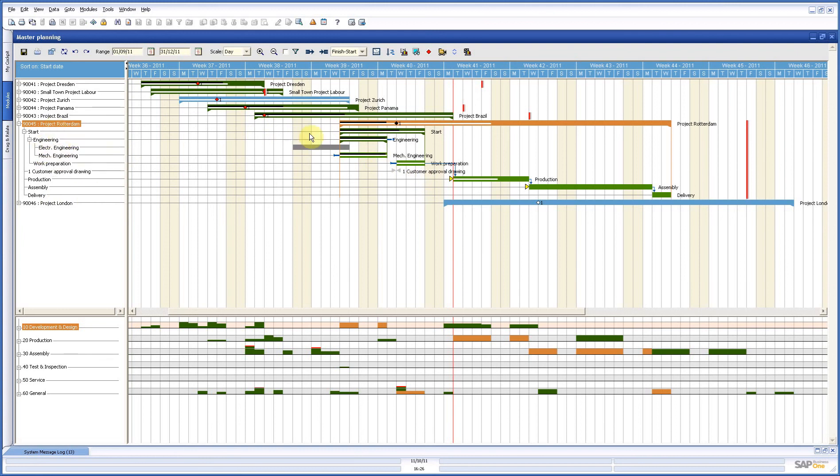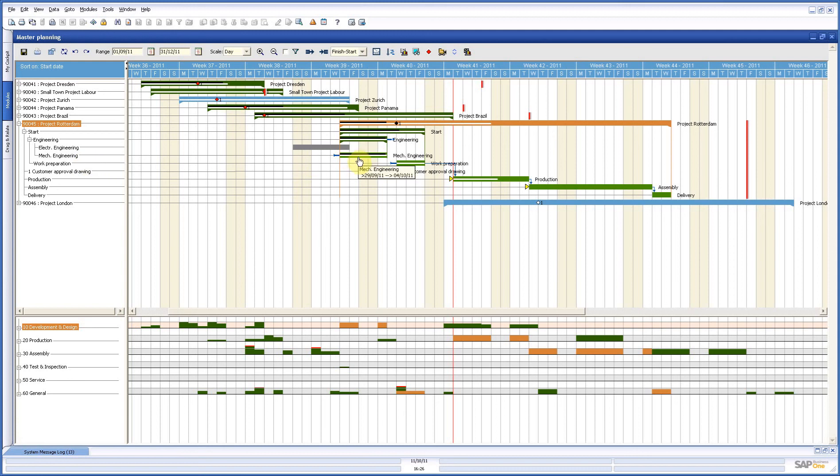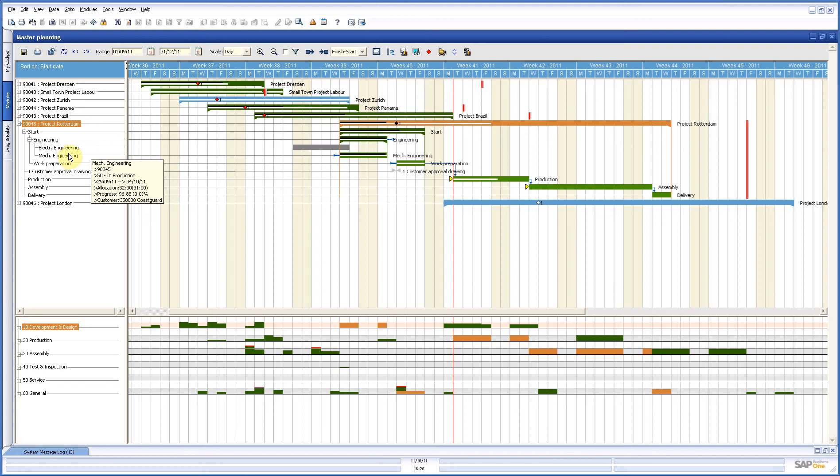First of all we see white and black lines in our activity bars. What does that mean? The white bar means that it is already planned, so in the department planning. And the black bar means there is already worked on. So if I put my cursor here, I can see that my allocation is 32 hours. Between brackets I can see that I worked 31 hours and that represents this black line.